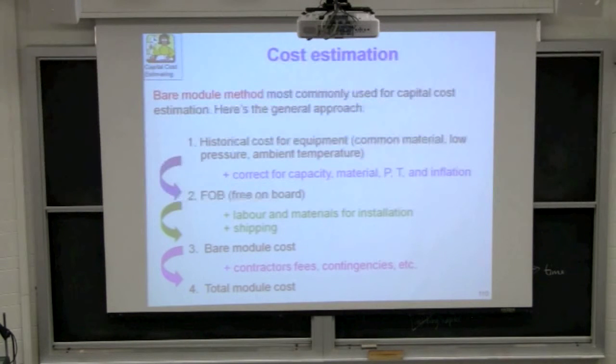So it depends on who FOB, that's important then, right? If FOB is, in that example, Osaka Airport, I would be responsible for import costs from Japan to Canada. But if FOB for that company was Mississauga and a specific address, then they're obviously responsible for getting it from Japan to Mississauga and they would be paying for import costs. So FOB is an important concept because it involves topics like ownership, insurance, and import duties.